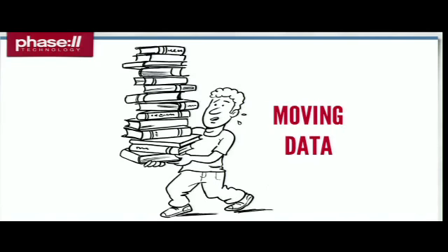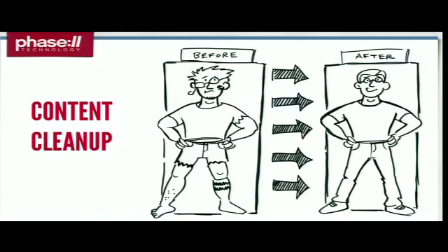We have had, I don't know how many clients tell us, you know what, don't worry about that. It's expensive, it's difficult, it's risky. We don't want to pull that off. We're just going to re-enter the content ourselves. No, they're not. They're going to end up relying on you to do that anyway. So whether or not you think this is going to be a part of your process, plan for it to be part of your process. If you don't have the skill set in-house to do it, go out and get someone that can do this process. Don't assume that the content owners are actually going to re-enter the content by hand. They're just not going to do it.